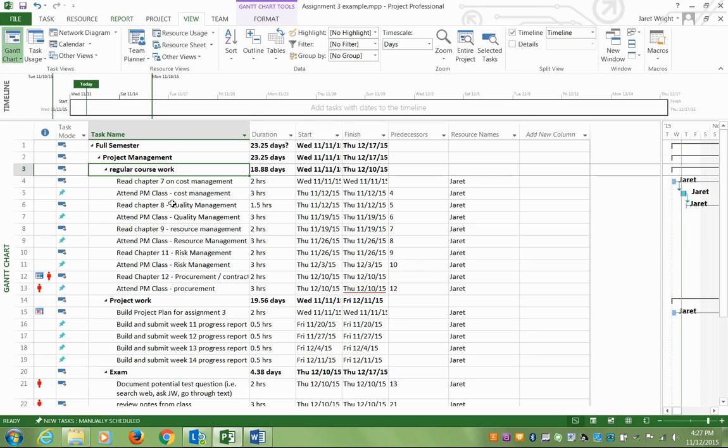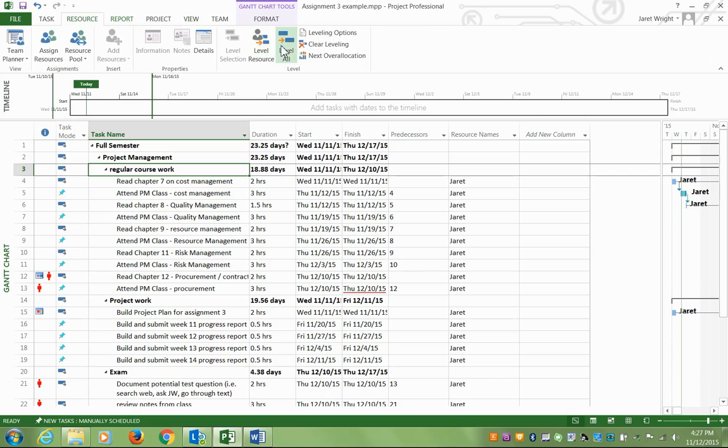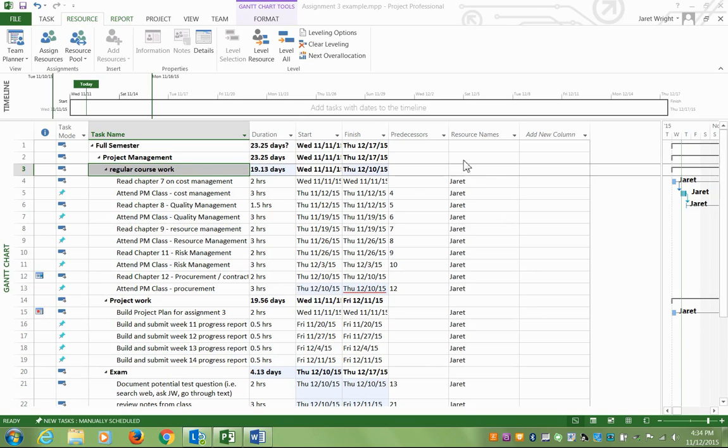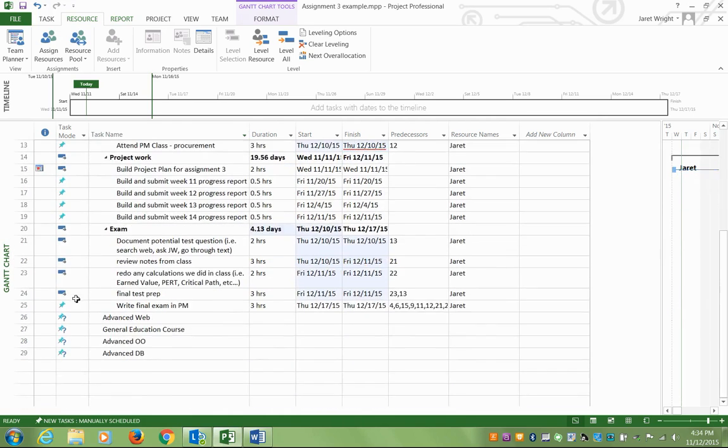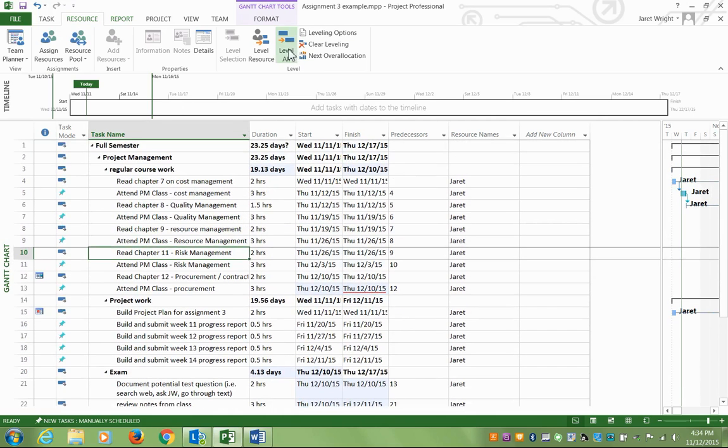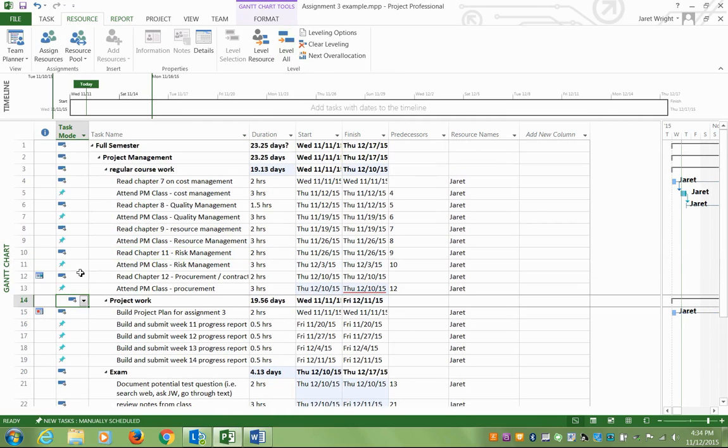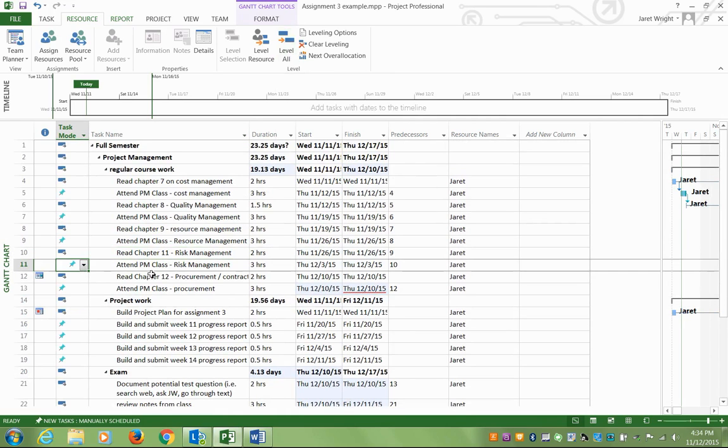So if I want to fix that problem, I can go to resources, level all. You're going to assign yourself to all of these tasks, and you're going to level the resources. We just finished with the level all, and that will move things around. Anything that's auto-scheduled, it can move around inside of the plan to make it fit.